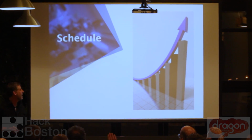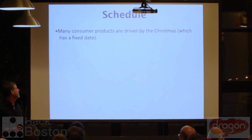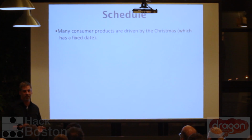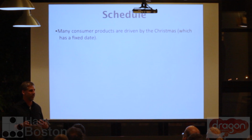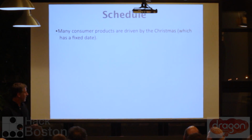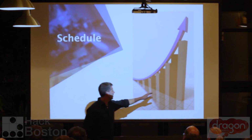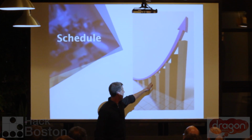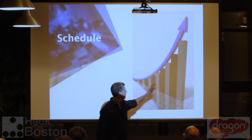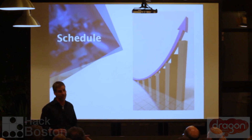All right, no problem. So, schedule. The third part of our triangle is that many things in the consumer electronics world are driven by the holiday season, and unfortunately it has a fixed date. You cannot move Christmas. The way the sales go, and I think I've got it on this picture here, is that this is Black Friday, the day after Thanksgiving, working up to Christmas. If you're late, you lose the long bar, which is where all your revenue is, and that doesn't come back because that curve is going to drop to zero.